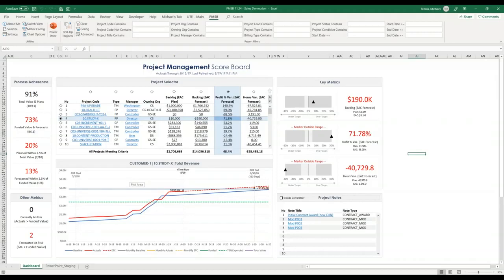And then you want to turn those plans into people assignments and expense budgets. And what this chart does is it compares the forecast, that is actuals to date, plus your people assignments and expense budgets, and it compares that to your original plan. It also compares it to your funding and ceiling value on your project, so you know at any given time exactly where you stand and when you're going to run out of money, etc.